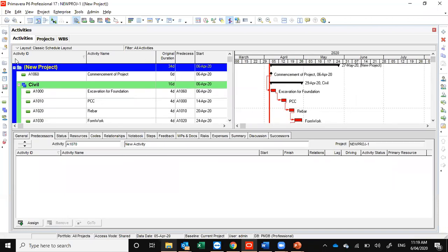Whenever we are planning a project, we can add a set of WBS. It's a good way of representing the sub-components of the project, or we can say the products of the project. It is not required that we add the WBS every time. If we are doing L1 planning, then you can add a set of activities directly at the project level. Then, in the second level, we can describe in detail with WBS and a set of activities.